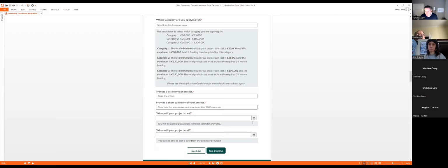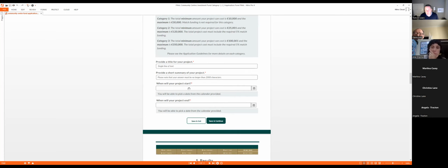Okay. Because you could say that currently it's virtually impossible to get trades out to do work because they're so busy. So you might have a start date in mind of, let's say, September, but you might end up starting in October. So they're not going to stick you to these dates. This gives them an idea in terms of when their funding will be drawn down. Because you don't know when they're going to give you the money anyway. So you can't pick an exact date. It has to be just an estimated date.